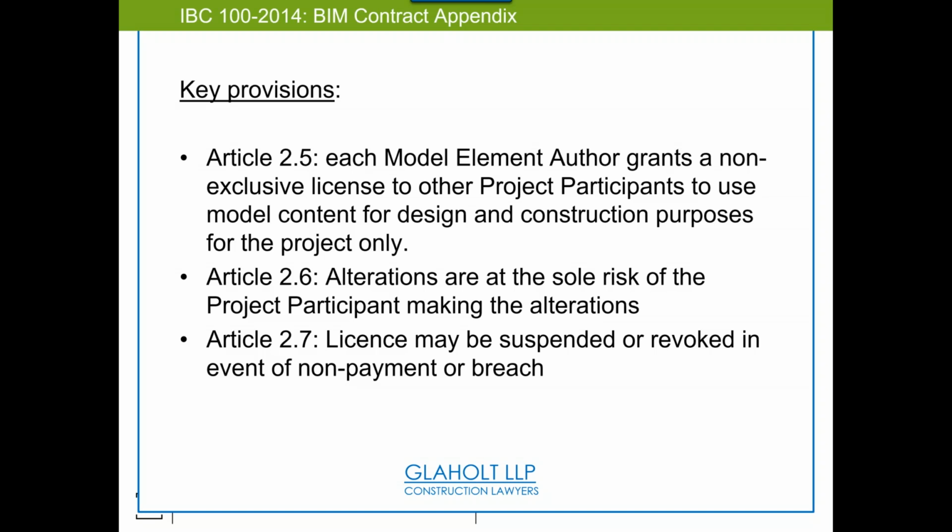If I put my Revit model out there, for example, I'm picking on Revit a lot today, but I put my Revit model out there and it's a central model, and you open it and you move the door, you're incorrect. You're potentially liable if there's a financial impact. Don't move the things that you're not supposed to move. And when you go into the real world and get experiences like this, you're going to hear people say, oh, I'm going to move the structural columns because this is what I want to see. And I'll say, well, why don't you just talk to structural? Oh, it takes so much time. Like, that's the worst answer. I don't even know what to say to that. So I come from this diligence world where, if I want the column moved, I'm not going to move it. I'm going to identify that there's a change I want, and I'm going to go to the model element owner and ask it to be moved.